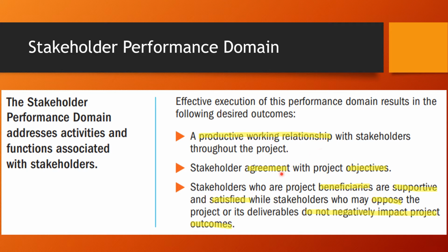The second desired outcome is agreement with project objectives. We need to agree on the objectives of the project with all the required stakeholders. It can be a project sponsor, executive leadership, a project manager, a PMO, team leads, team members, everyone. So we need to bind an agreement on the project objectives, right? You need to define a vision and mission, create a project charter, and run with these stakeholders and agree on it with them.